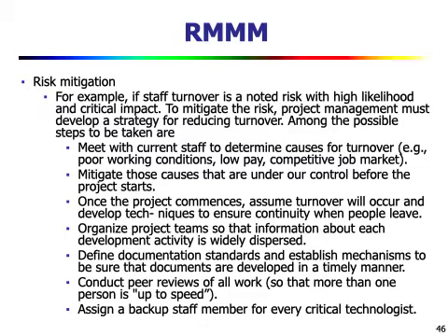If such a situation exists, then to mitigate the risk, the project management must develop a strategy for reducing the turnover. Among the possible steps to be taken are: meet the current staff to determine the causes for turnover. Second, mitigate those causes that are under our control before the project starts. Once the project commences, assume the turnover will occur and develop techniques to ensure continuity when people leave.